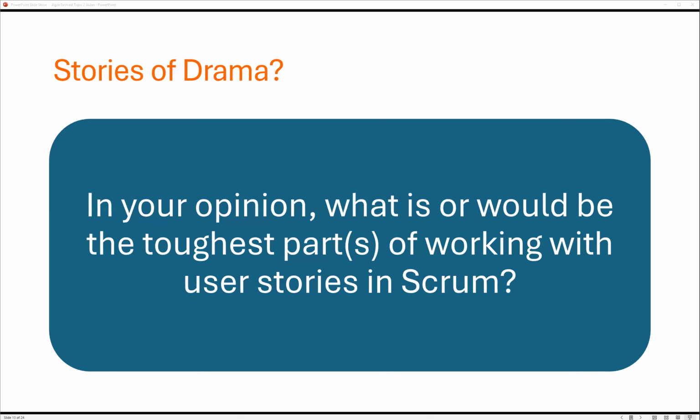Questions? Yeah, we've got a few. Can a Scrum Master play the role of a product owner too? Although I see that Saphir, I think it is, said maybe not. Yeah, my rule is absolutely not. And I do mean absolutely not. They are roles that are meant to be in tension. It would be a recipe for disaster if somebody wore two hats that were meant to be in partial conflict with each other.